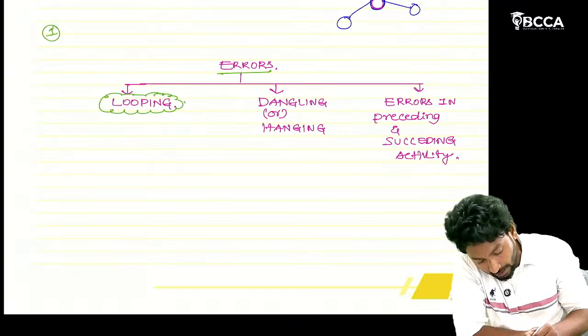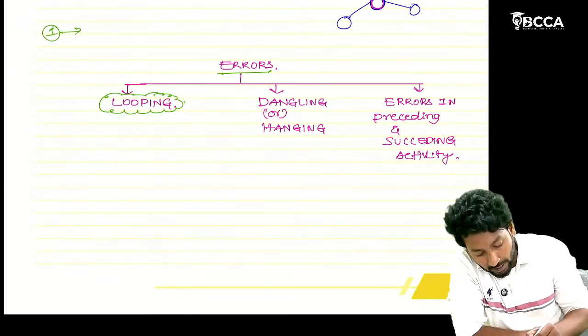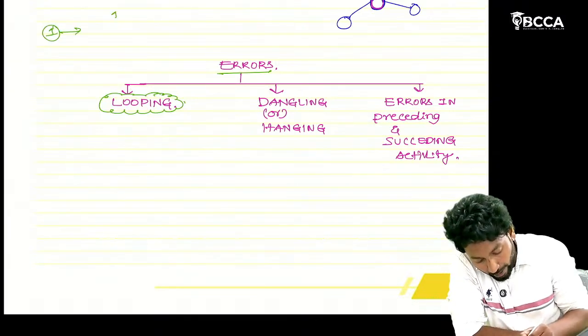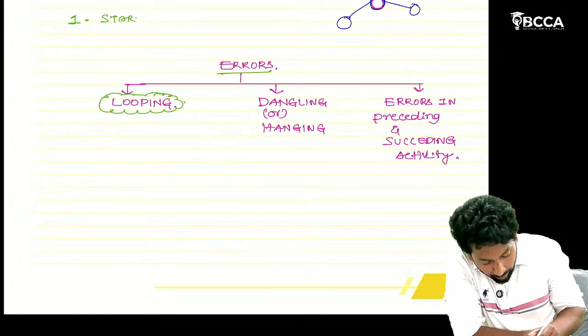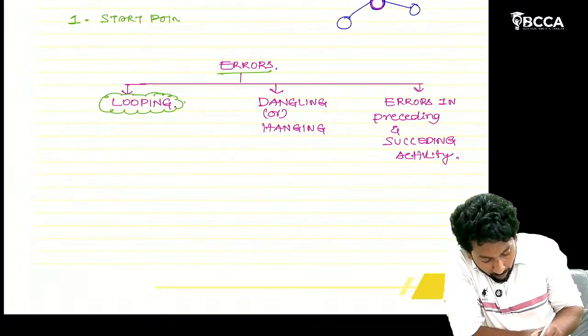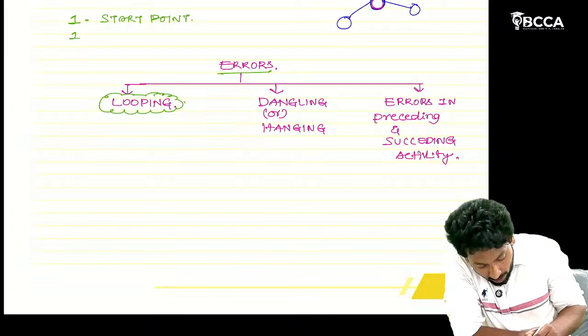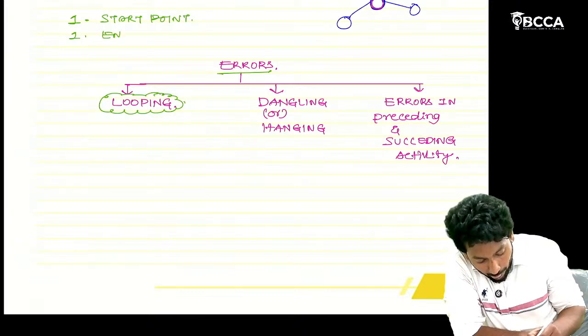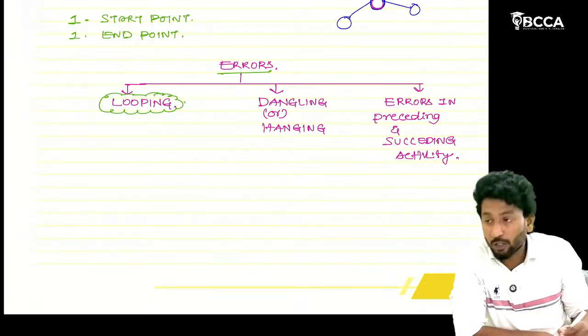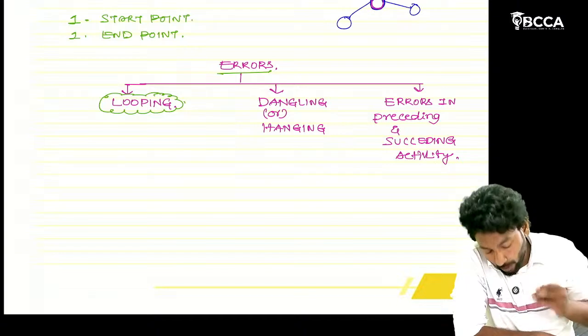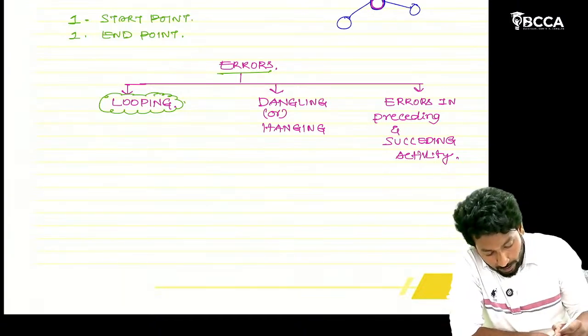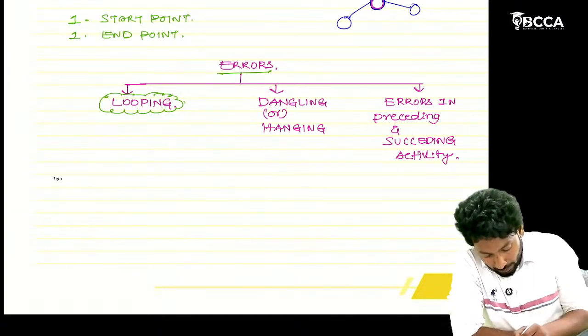For every project there should be one start point and one end point only. With that, let us start with this looping error.